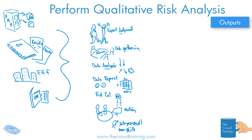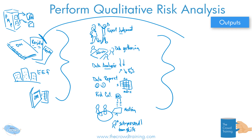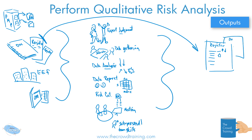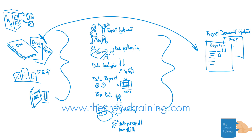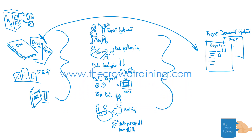Lots of different tools and techniques — and it all gets easier because the output is just one. This risk register at the beginning is what we are trying to elaborate on, add more to, and expand upon based on our identification of how impactful these risks are. Yes, there could be other documents that are also updated, but really the output is your project document updates. That is a quick review of the inputs, outputs, tools, and techniques of the Perform Qualitative Risk Analysis from Crowd Training. When we do the quantitative risk analysis, you'll see it's pretty similar, though the methodology might be slightly different.